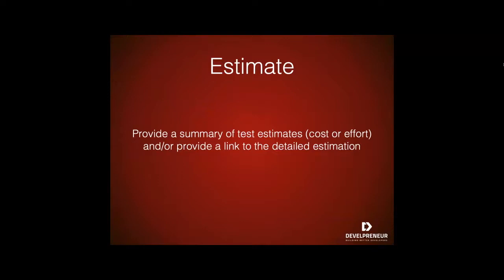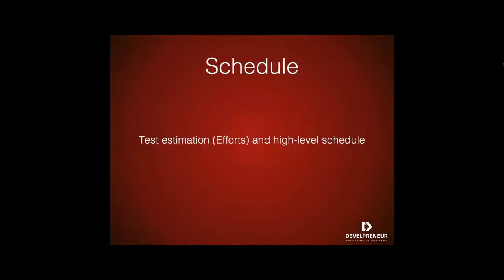There are many elements to be considered for estimating the effort required for testing. It is critical that as much information as possible goes into the estimate as soon as possible in order to allow for accurate test planning. And you also need to make sure that you understand what needs to be tested, because sometimes you test the functionality of a click of a button on the screen. You may look at that and say, oh, that's a quick 5-minute, 10-minute test, when in reality, clicking that button may have a larger impact on the back-end systems. That pushing of the button might turn the lights on or kick off another process. So you may have to dig a little bit deeper into what the task item is before you can actually estimate time to it. Poor estimation of times can result in poor scheduling later.